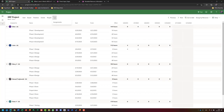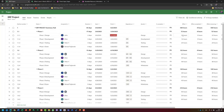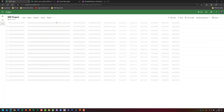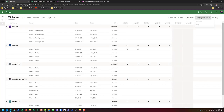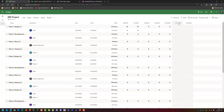After refreshing, I set John to work 16 hours each day. Since it's a fixed duration task, John ends up working 32 hours across two days. To recap: the second great feature is assignments, which gives you the ability to group by resource — essentially resource usage view — or group by task, which is the task usage view.